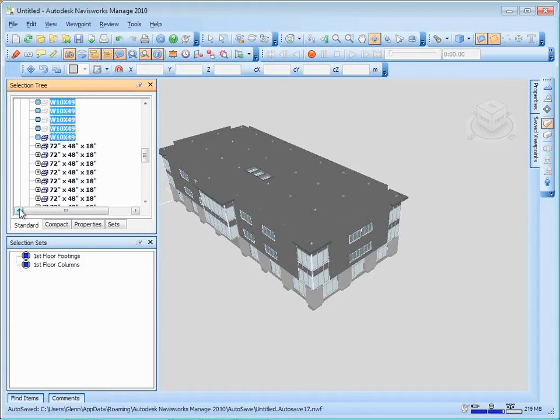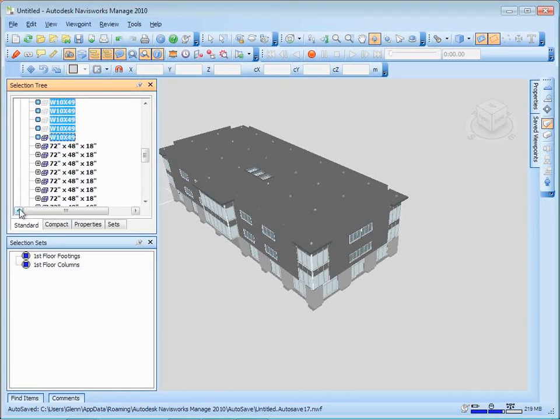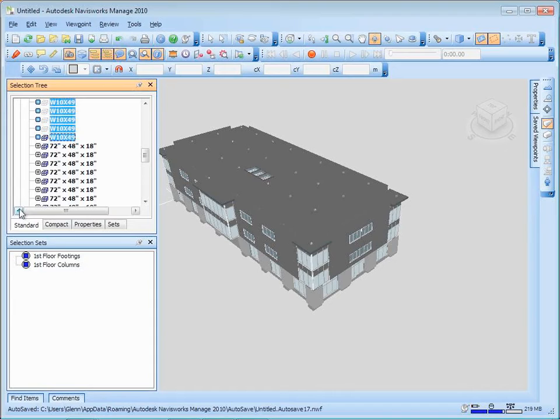The deal is, this is going to work really well for some items, but pretty soon we're going to start getting to different items that are kind of hard to select. Actually, there's two problems with this method. Let's talk about both of them. The first is, this is a static method. If I go through and select things and give them a name like this, that's not dynamic. That's actually these 32 items that I just selected are part of the selection set. The problem being that if you update the model and you add a few more, they won't automatically be in there. Because it's really just the static set. So that's not very good. Because if my model is likely to keep on changing, someone's going to spend their whole career just going through and trying to make sure that everything that's in the model, made it into the selection sets, and it's really easy to make a mistake when you do that. So I tend not to like to do it as this manual selection method because I think it's just asking for trouble.